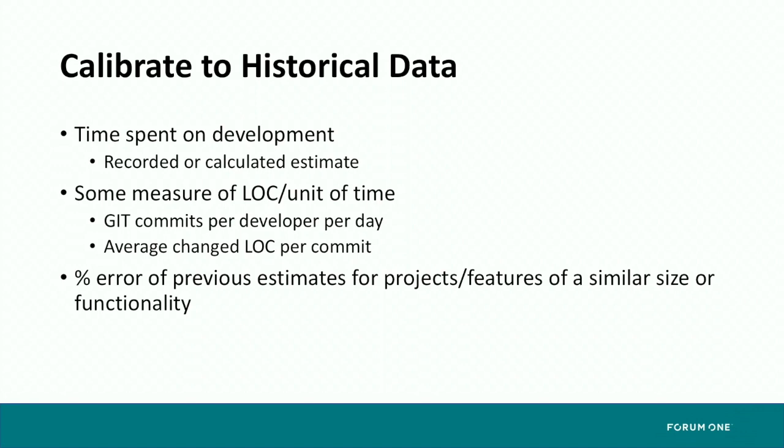So remember my Excel spreadsheet, where I said I've got that whole spreadsheet and I can look back and say, with some sense of accuracy, for me to deploy on Drupal 7 this type of feature, a view, to build a view, chuck it into a feature, roll that feature up, that took 3 to 4 hours. And if the current feature that I'm estimating is 4 views, well, I can now calibrate and calculate based on how long it took me to build a view in the past.